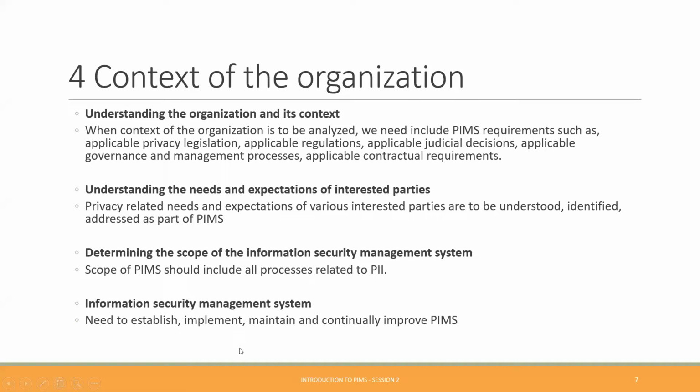Because as I said yesterday, implementing PIMS is project management. As a lead, the person who is going to implement PIMS works as a project manager. When you want to do project management, the first thing you need is a plan. To have a plan, you need to know the scope. Only when you know the scope will you be in a position to size it and estimate it. Only when you estimate will you be in a position to plan it.